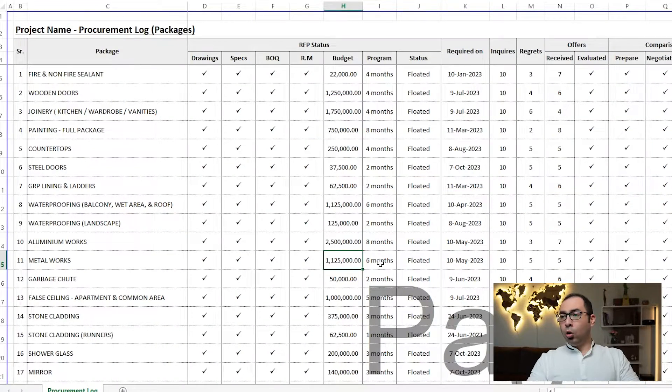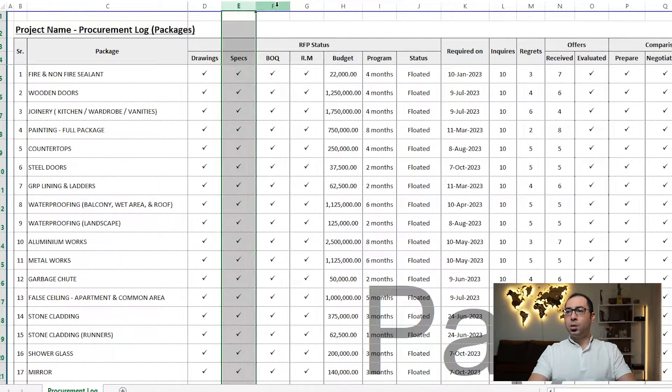Before you float the RFP, you also need the budget, because the budget will tell you during commercial evaluation what range you need to close this package on or below. You also need the program of work, because when you sign a contract you need to put a duration. The subcontractor quoting for you needs to understand the duration from day zero — a shorter than normal duration will increase his price.